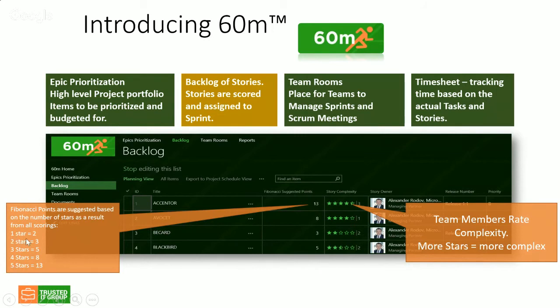And the scale. So the more complex the story, the higher the number of points that will be assigned to that particular story. But that's something that we're proud of to a degree, where the teams from all over the world don't have to be on that grooming exercise meeting. They could be anywhere, and they can vote for the story complexity, and then it will be suggested that this is 13 points or 8 points or 3 points or 5 points. I'm sure that the Scrum teams will appreciate that flexibility.